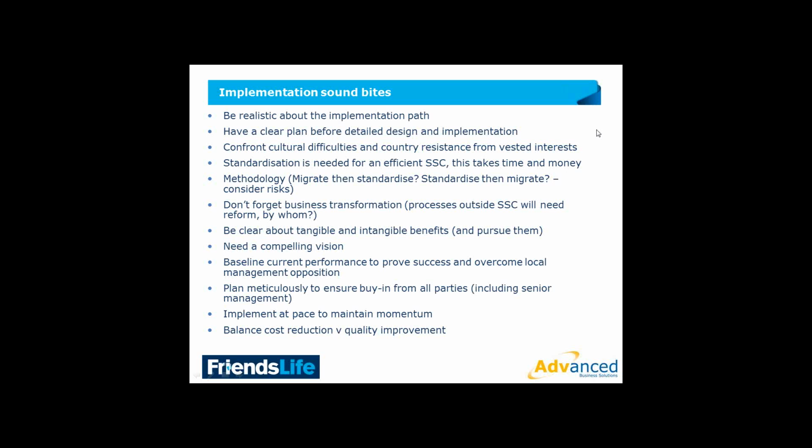Really, really essential as well was to baseline current performance, how quick we're paying invoices and those kind of things, because people come back and forget what it was like a year or two previously. So keeping those statistics just so we could remind them that we have improved, we are on target, and we are doing it at less cost or whatever the key things are.